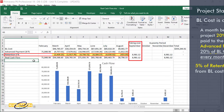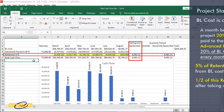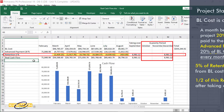When the taking over certificate is signed, half of the retention that was deducted every month is returned to the contractor. And when the liability period mentioned in the contract finishes, the other half is paid.